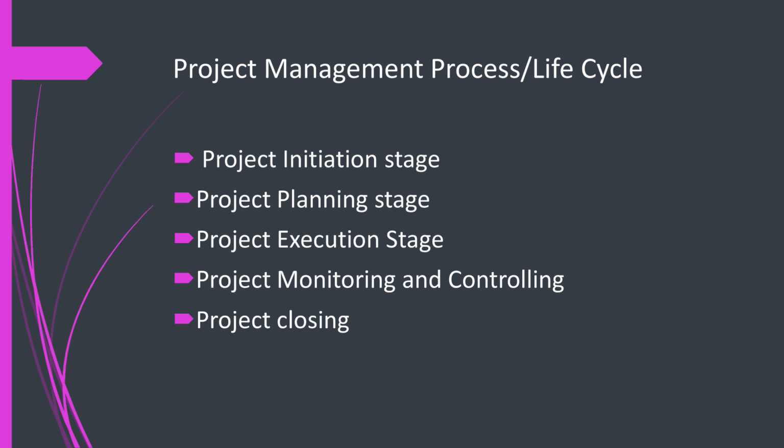Number 2, document lessons learned. Yes, you document everything. Number 3, you evaluate the project success. You tell yourself, was this project really successful? Was this what we aim to achieve? Did it cost me more? Did it cost me less? What can I say about the project? What did I learn from this project as a project manager? Going forward, what can I correct? If I get a similar project like this, what can I adjust? What personnel can I bring in? Who would I not work with? You document all this as a project manager. And finally, you release resources. You basically are done with the project, so you're just doing the documentation.